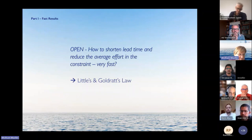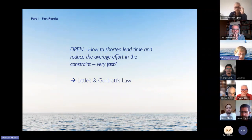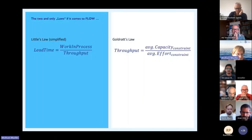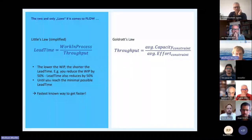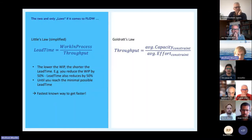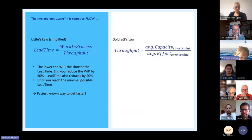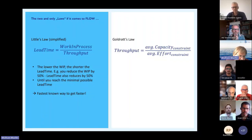Now it's all about how to reach this. The first thing is how to shorten lead time and reduce the average effort in the constraint — and that has to be done very fast, otherwise it won't work. This is a collection of formulas every manager has to know: Little's Law and Goldratt's Law. Little's Law is very well known: lead time is proportional to work in progress divided by throughput. If you reduce the work in progress, the lead time of the remaining projects reduces — very simple.